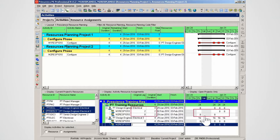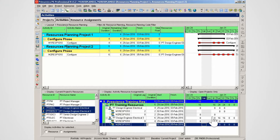Note the work for the design engineer electrical is split between the two activities. Repeat the process for the second resource, but place the lag of two days on the second activity. The original lag of two days is applied to activity two for design electrical engineer three, and the original duration is reduced to two days for that activity.